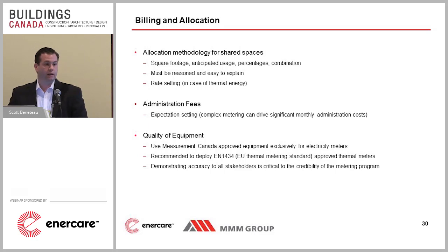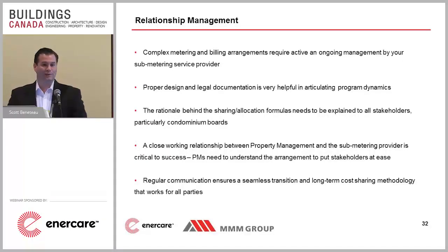Legal considerations. If you think the metering is complex, wait till you try and put it all on paper. It can be a daunting task for respective legal counsel to draft this in a way that's easy for everyone to understand and that ultimately ties together. So it's important that the declarant has a shared facilities agreement that specifically delineates how the utility arrangement will be allocated. We see some that are very general, where all the parties will be responsible for certain utility costs.